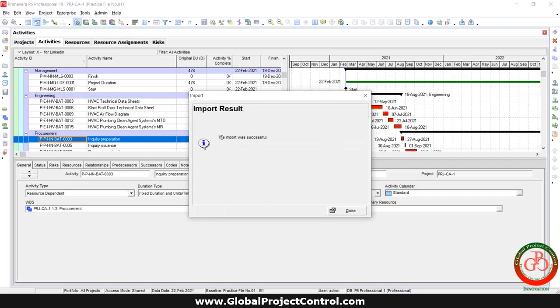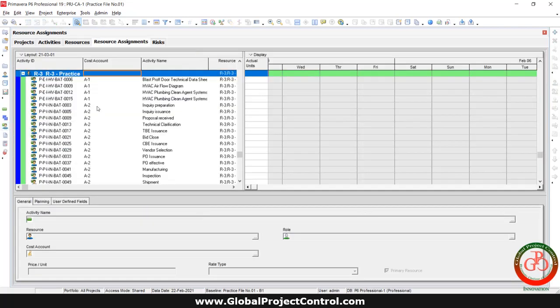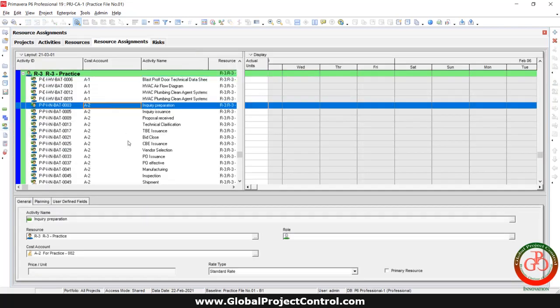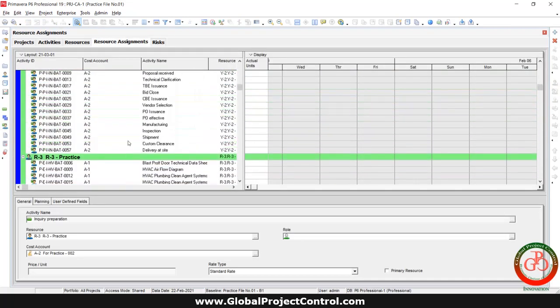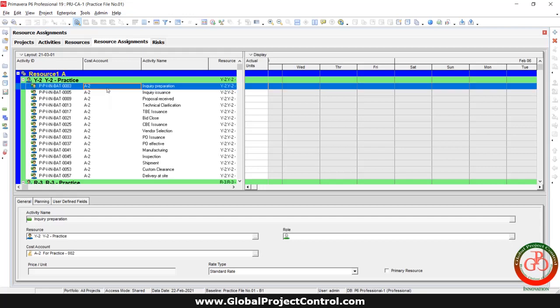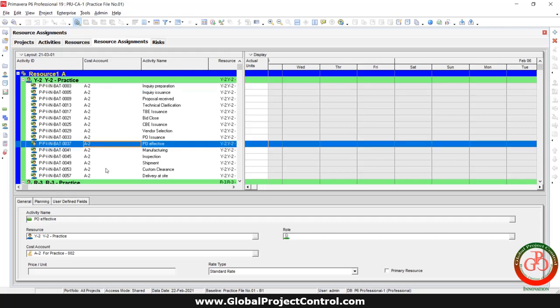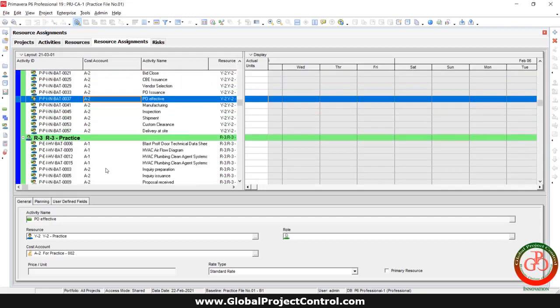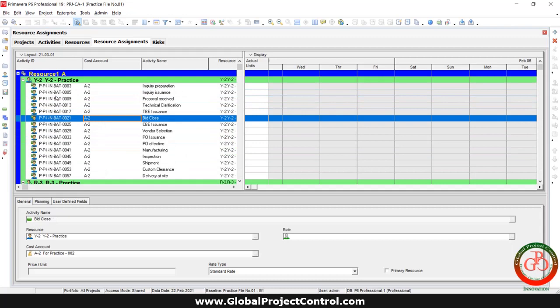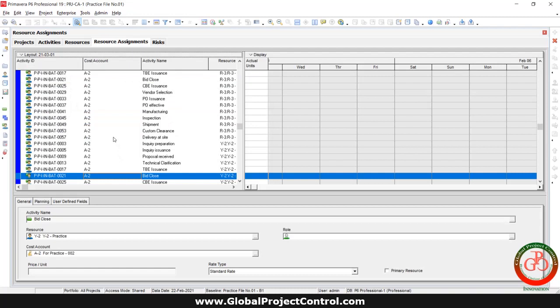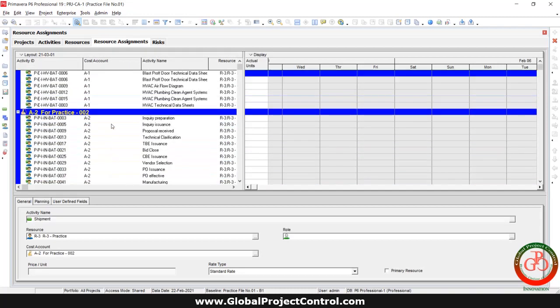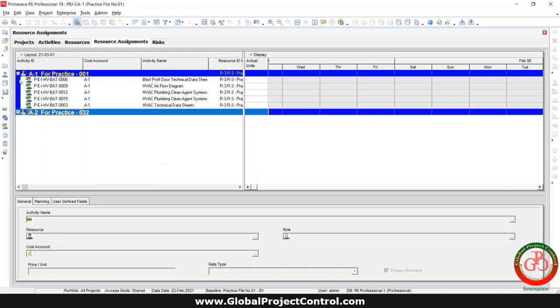The import was successful. Right now, let's see what happened to the resource assignment. On the resource assignment, you can find that I assigned the cost account for each of the resources. And in the group and search, you can change the cost account for sorting the activities in the project.